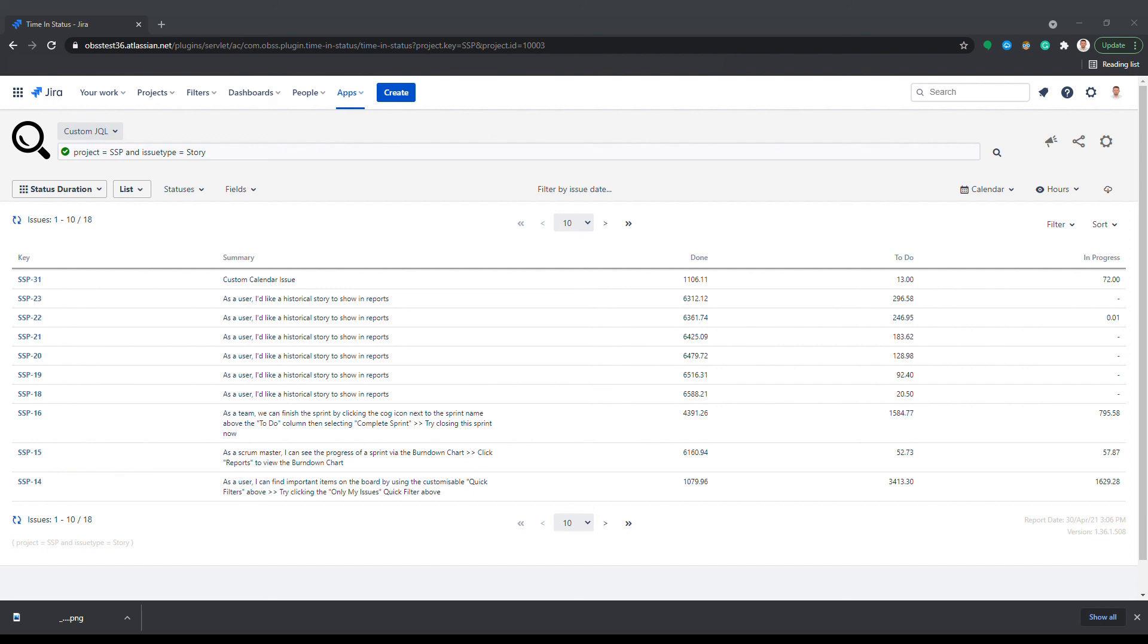For example, you can get an assignee duration report and include only in progress status so you see the actual in progress time for each assignee and non-working status times do not contaminate the output.